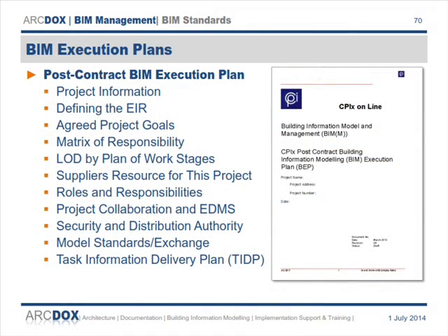Okay. And again, this is a document that will be developed from a collection of other documents, in that the designer's information, the employer's information requirements, the capability assessments, and the various different subcontractors' information will all have to go into this final post-contract BIM execution plan. Okay, and this will be developed by the project information manager for the construction stage, if you want to call it that. Post-tender information manager.